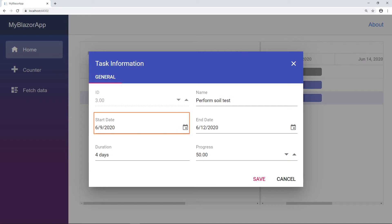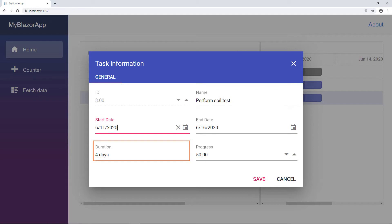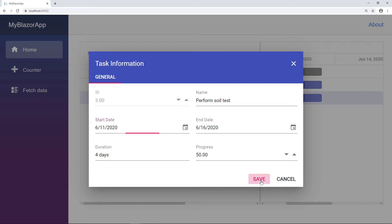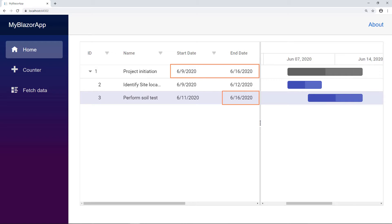You can see the start date is June 9th and the end date is June 12th. This is because the duration of the task given is four days. I change the start date from June 9th to June 11th. Since the duration of the task is four days, the end date was automatically adjusted to June 16th. I click the save button. You can see the changes have been updated in the tree grid for that row. You will also notice that the start date changes have affected the end date and duration of its parent row — where it was four days, but now it is six days, because one of its child tasks extended for two more days.